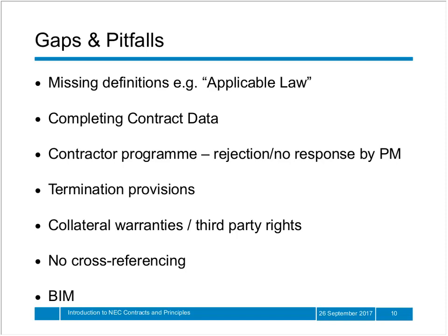A particular pitfall to be aware of is the importance of completing the contract data section, because this information often doubles as the definition referred to in the conditions. So, for example, all reference to the works in italics leads back to the empty box for that term in the contract data, and therefore any failure to complete that with an adequate definition, or worse, leaving it empty, would result in a large hole across the contract.